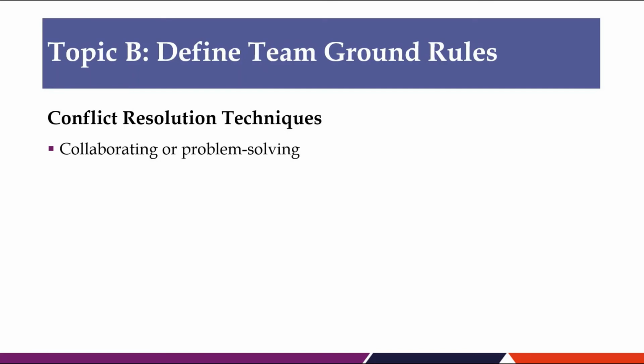Compromising or reconciling. This technique involves finding solutions that bring some degree of satisfaction to both parties. This is a lose-lose situation since no party gets everything. Did you know that compromise is not the best choice, but rather second to collaborating?